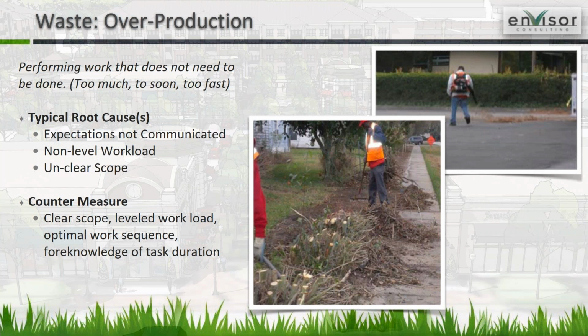I got there about 9:30 in the morning and was sort of pulling out my hair. Why on earth did you cut down the shrubs? Because they'd spent, at this point, all morning, 3 guys, cleaning up all the debris from the chainsaw work that they did first when it just wasn't necessary. All we needed to do was chain up those shrubs, jerk them out of the ground, drop them in the dumpster. It's not that they weren't working hard. It's just that cutting down the shrubs had no value.